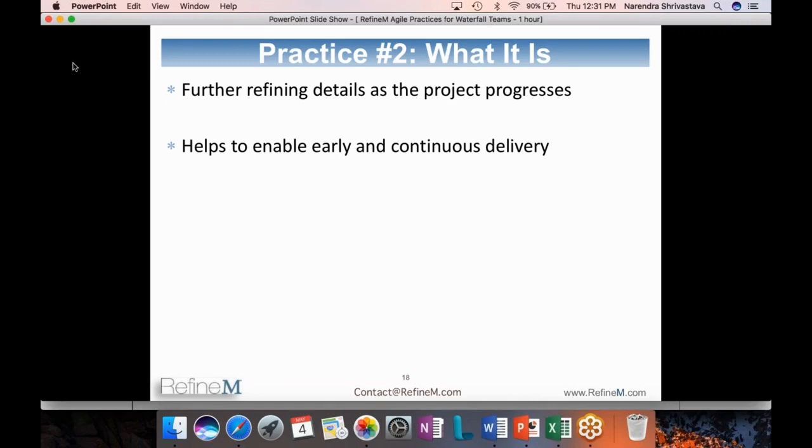So you first develop a product level plan, and then you come to the release. Say, okay, this product will have 4 releases, and then for each release, take the first release and say on this first release we'll have 5 sprints, and then you go and focus on the first sprint. So detail out the features, the stories, or whatever you have for the first sprint, then go to the second sprint. So you refine details as the project progresses. That's what progressive elaboration is.